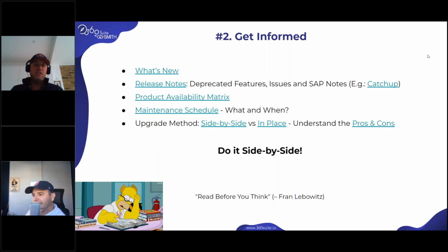So if somebody was telling me right now, Patrick, I want to go live with 4.3 in 2 weeks, I'll say, okay, fine, but that's a bit of a shame when SP1, which should have all of the catch-up stuff, would be released the first week of December. Are you sure you can't wait maybe just another couple of weeks or even early January? What's the rush? So again, have a look at the schedule so you can decide what is the best time for you to upgrade with the best version.